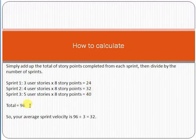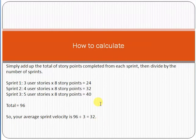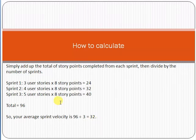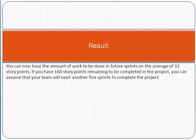So 24 plus 32 plus 40 equals 96 total story points. The average sprint velocity is 96 divided by 3 sprints, which equals 32. So 32 is the sprint velocity of this team. In each sprint we calculated how many story points were completed, added them all up, and divided by the number of sprints to get the sprint velocity.